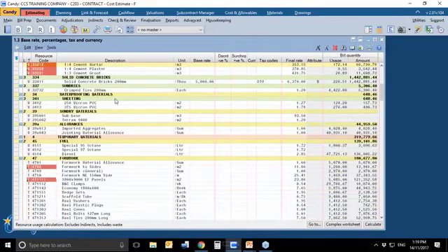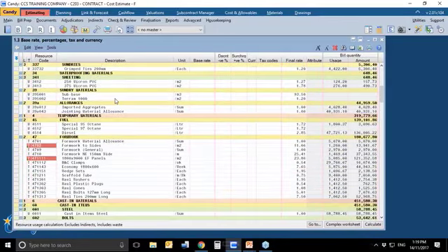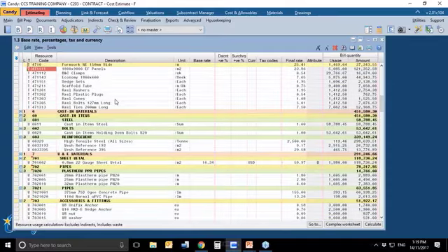Let's go and have a look at the same resource, sheet metal, which was 701002, 0.8 22 gauge sheet metal. I'm buying the sheet metal per square meter. The base rate is 16.34. The base rate is a rate which is used to calculate your final rate. If you're buying a resource in a foreign currency, the base rate should be in the currency of origin. So in this case, I'm buying the sheet metal in US dollars, so the base rate is in US dollars, 16.34 US dollars.